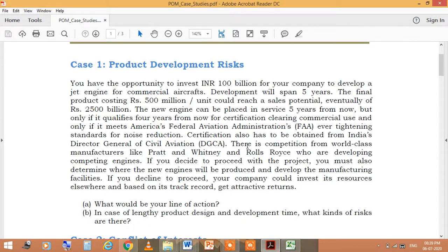could reach a sales potential eventually of Rs. 2500 billion. The new engine can be placed in service five years from now. We have to take risk for these five years, but only if it qualifies four years from now for certification clearing commercial use, and only if it meets America's Federal Aviation Administration (FAA) ever-tightening standards for noise reduction.